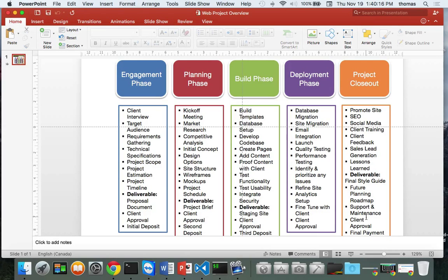And if he agrees, right, I want to get as much money down as possible, right? I want to get at least 25 to 35% here in this phase. And my second phase, I want to get at least 50% together, right? Now, if you talk to Rich, he'll say, I don't know, man, if I get 30%, I'm lucky, right? But I'm of the mind, the more you get up front, the more commitment the customer has, and it's how you sell it in this particular case right here. I try and get as much down as I can.